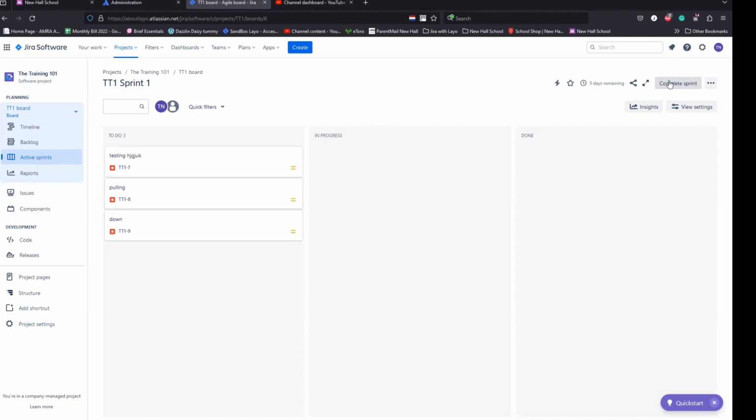So once you go into your reporting side of things, you can see what happened throughout the 2-week iteration. What's the story pointing? Did you deliver things according to what we said we would deliver? Did you add or remove anything within the sprint? You can view all those in your velocities and stuff like that in the reporting section for that sprint. And all that would be enabled as you start your sprint.